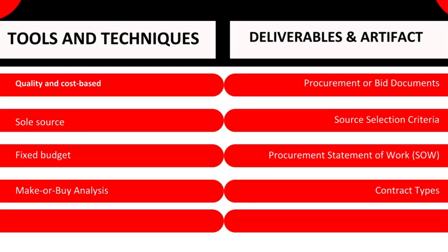The team leader then coordinates the procurement strategy with the project's schedule, budget, and other requirements. For example, the team leader ensures that the software licenses will be purchased before the team begins development on the mobile app. The team leader also develops a timetable for key procurement activities. For example, the team leader schedules a meeting with potential suppliers to get quotes for the software licenses.